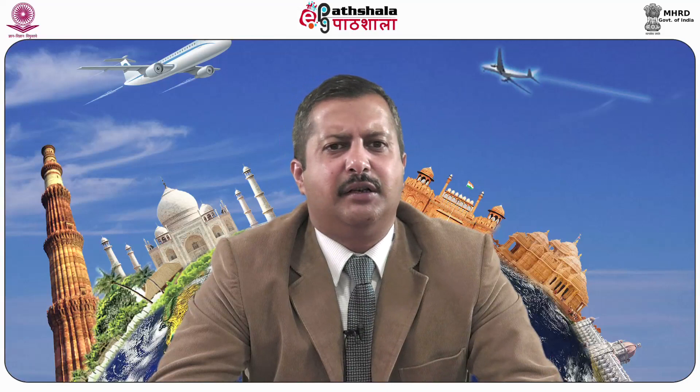The following areas should be taken care of: land site, terminal, sustainability issues, flexibility, local community issues and environmental issues. Moreover, the evaluation criteria may also be grouped into A-site, land site, terminal cost, site etc., with scoring given as plus 1, 0 and minus 1. Idealistically, the yield of the subsequent evaluation is known as the recommended terminal development concept.